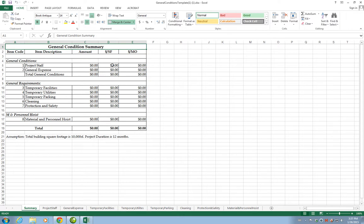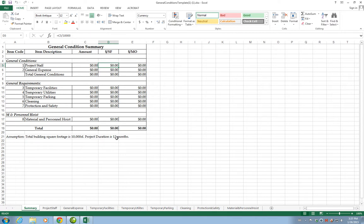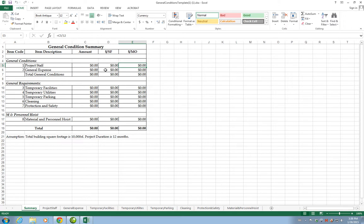You could calculate also the cost per square foot. In this case, the building square footage is 10,000. This number here is calculating the amount, which is in cell C5, C5 divided by 10,000, to give a cost per square foot assuming a 10,000 square foot project. It also assumes a duration of 12 months. For dollars per month, it's going to divide the amount by 12 to calculate the dollars per month. After we have an amount in Project Staff or any of these categories, it's going to calculate automatically for us the cost per square foot and the cost per month.